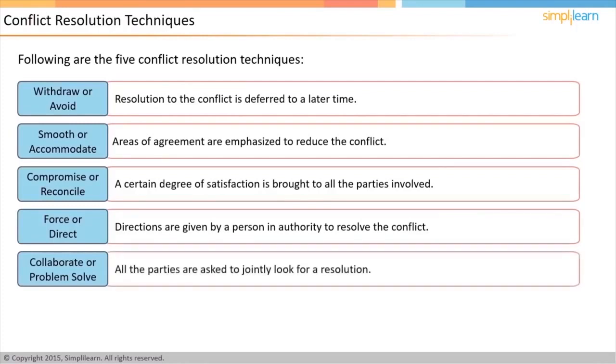In collaborate or problem solving, the parties in the conflict are asked to come together to collaborate and look for a resolution to the problem. This offers the greatest likelihood of a satisfactory and permanent resolution, and should be resorted to whenever possible.